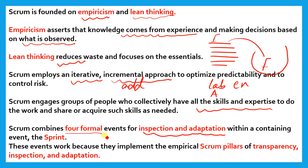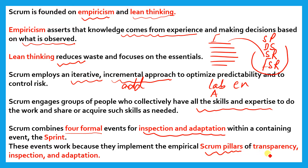These four formal events are for inspection and adaptation. Let me explain quickly: what are the four formal events? Formal means we have to follow them — we cannot escape. The first is Sprint Planning, then Daily Scrum, the third is Sprint Review, and the fourth is Sprint Retrospective. These events work because they implement the empirical Scrum pillars of transparency, inspection, and adaptation.